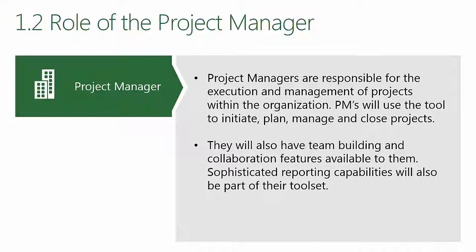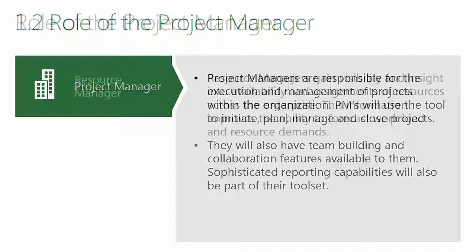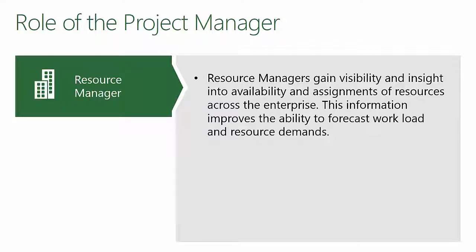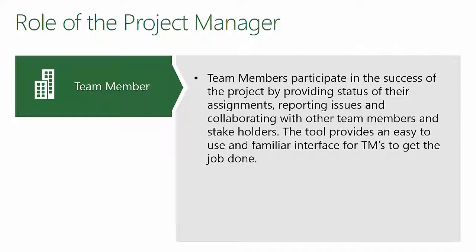Project Online is considered a role-based environment. Users are associated with certain roles that translate what they can do within the system. These roles are in parallel to specific security settings. For example, resource managers will gain visibility and insight into resource assignments and availability. Resource managers will often be tasked with finding available resources and building project teams. Team members are the backbone of any given project — these are resources that will be assigned to tasks and are responsible for doing the work and reporting their progress.